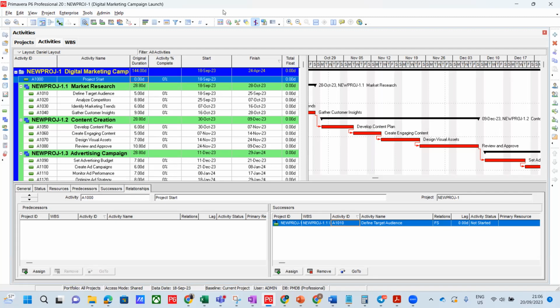We want to get Daniel because he will do a perfect job within 5 days. So we are time bound. We need somebody. Then they will pay your company. It's not that you will get that £200 per hour. Your money might be £30 an hour by the time they pay you a monthly salary, especially if you're a permanent staff. So your company overhead and all that goes into the remaining 170, and your company makes profit and all that. That's the overview of how they do it. So let's go to the software and get something done.